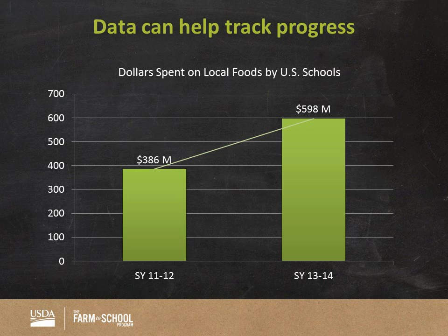Number 3, evaluation data can also help really track and measure the progress that you're achieving through your project. So one thing we ask each grantee to do is complete a baseline report. Hopefully many of the folks on the call have received an invitation to complete that report. And so that baseline report provides a starting place by which your project is set to take off. And the progress reports and the final report ask very similar questions, a few more of them, than what you will be asked or have been asked in the baseline report. And so by looking at the baseline and the final report, you can really understand the growth and the positive impacts that your project has achieved through its activities.